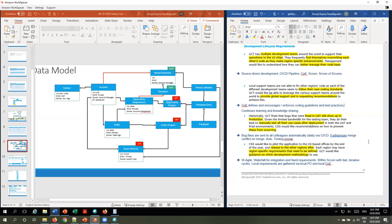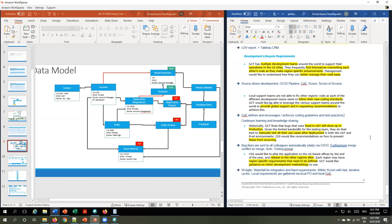You mentioned that we are going to have a global COE and local COEs — could you explain who will be a member of local COEs and how they will be structured? Part of the local COE is very similar to the global COE, just smaller in scope. We have local development teams in 10 different cities. The local COE will have as members: the local development team, local subject matter experts, local QA team, local PMO team, and local POs. Within the framework defined by the global COE — architecture, coding guidelines, and development guidelines — they will prioritize incoming requests, make sure the team exchanges information, and work within the framework of the global COE.